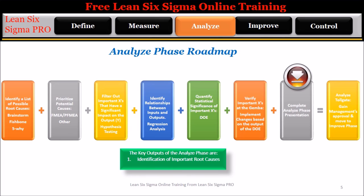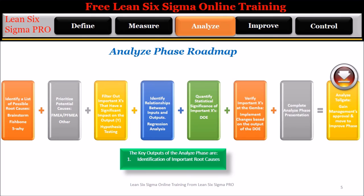Step 7: Complete the analyze phase presentation. Step 8: Analyze tollgate — gain management's approval and move to the improve phase. Note: the analyze phase tends to be the most difficult for students with little to no knowledge of statistics. We will spend a considerable amount of time during the analyze phase modules learning these important tools. The key output of the analyze phase is: 1. Identification of important root causes.